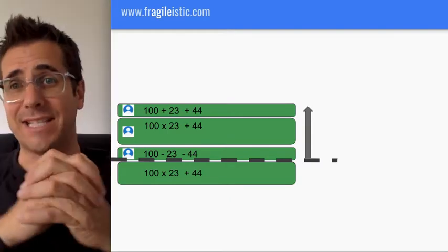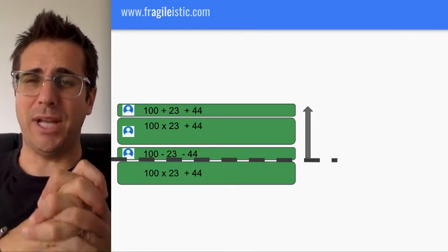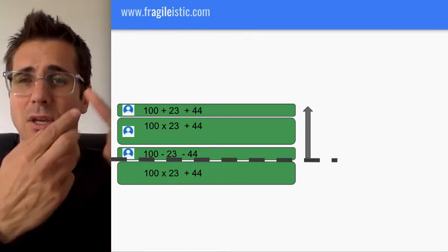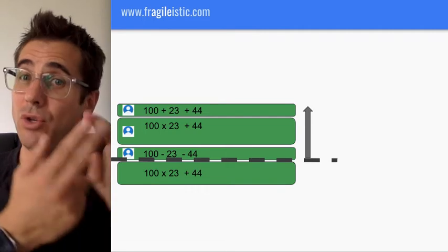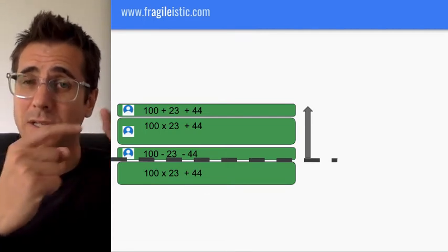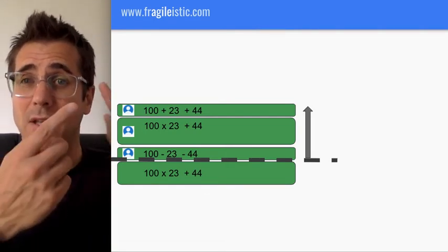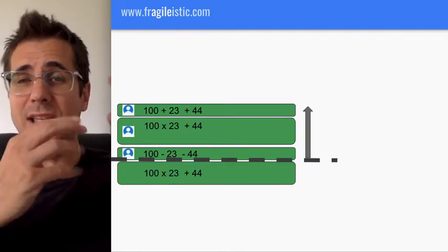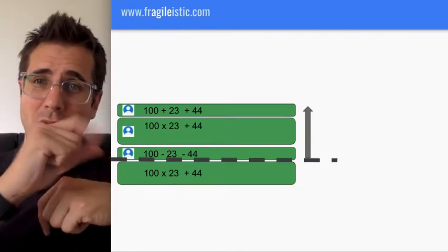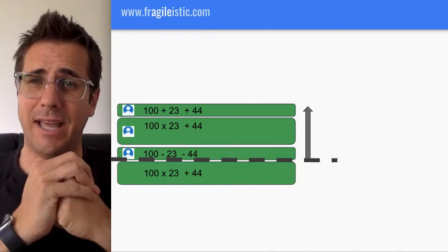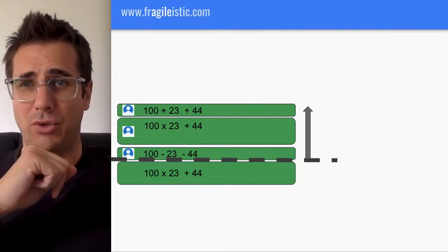Okay, now that's a planning exercise. When you're doing planning, you make sure your priorities are correct. You make sure you understand the size of your work. Your refinement should have got down what the outcome is. So make sure you've got the outcome, size, priority, make sure it's assigned, and then commit to how much you're going to get done. That's a planning exercise. Now I'm going to show you in the tools.